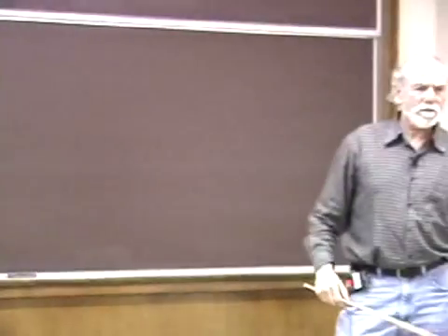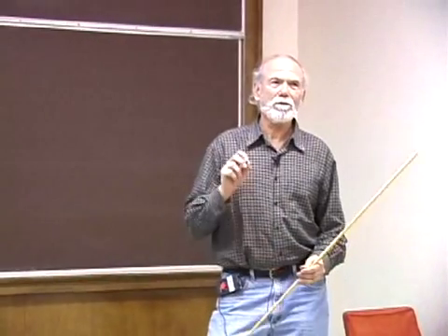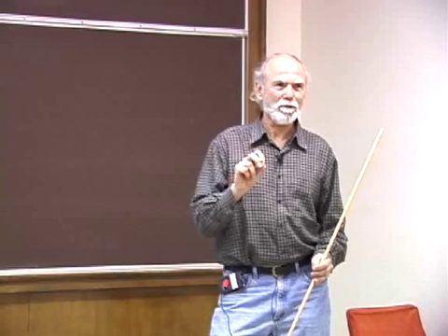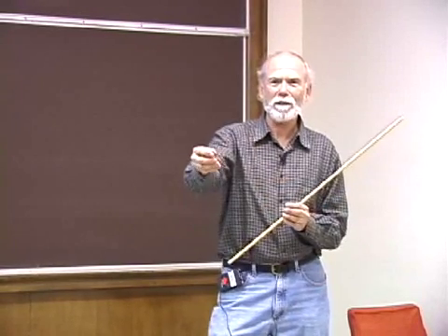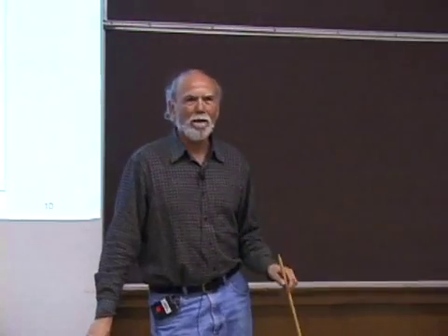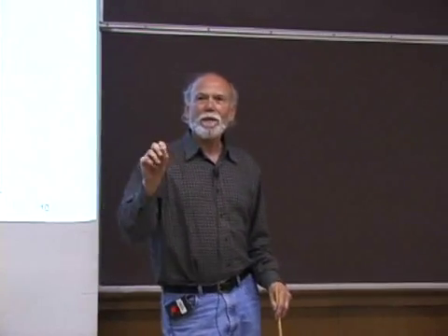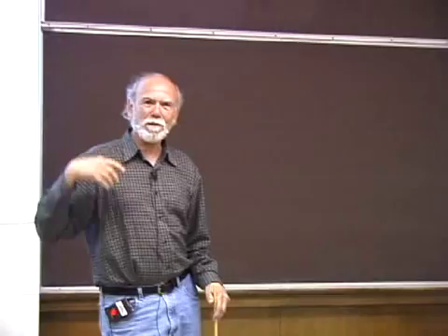Anything that we have some preliminary bids on: preliminary bids, you have to realize, are never the same as what somebody will actually sell you something for. That's when you go to some company and ask them what they will do this for, and they come back. So we assigned, I don't know, 10 or 12% to that. So any item where we had a piece of paper saying some company or somebody had looked at it, we assigned 10 or 12%.